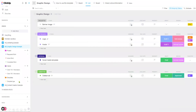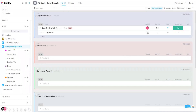Tasks are created for each project with another common hierarchy structure which can be used for graphic designers if their workflow processes do not fit into the previous process. This example would include a space for graphic design with folders for projects, clients, or templates. Lists could be created for project stage: requested, active, completed, client information, or a list for template types.